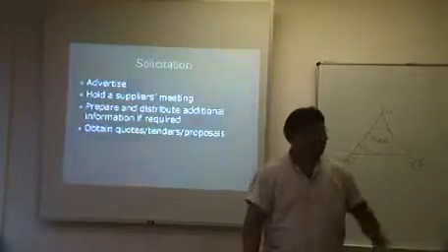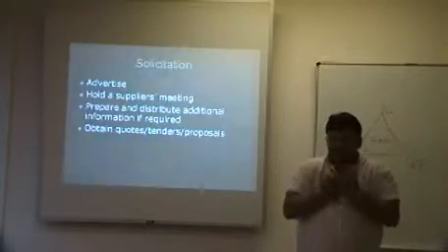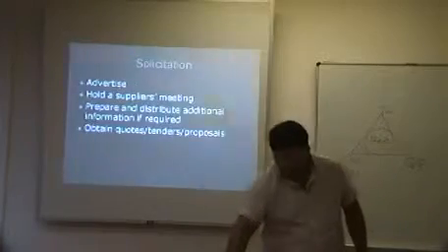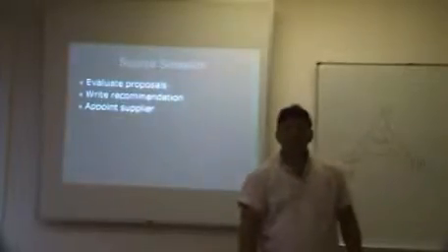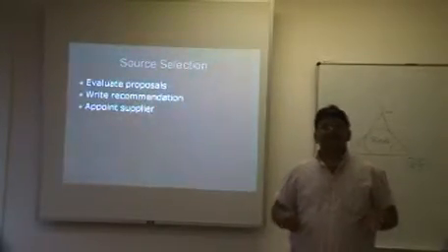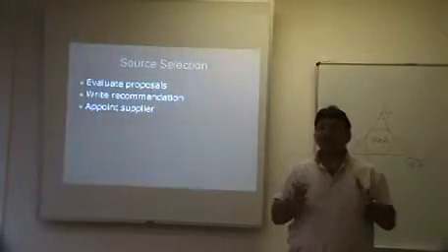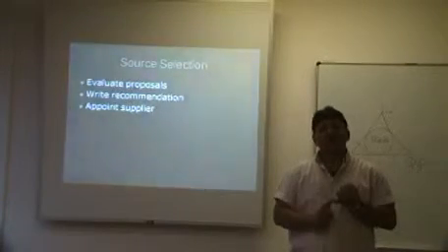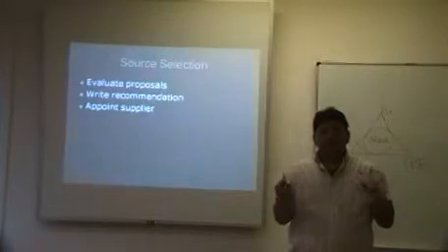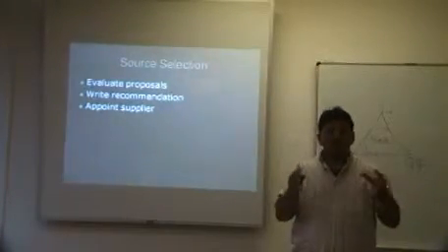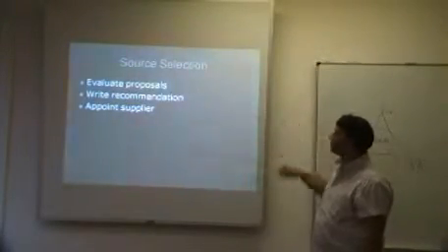Right? It depends on which process you went for there, and the company will receive all of those tenders or proposals. Source selection: what then happens in many companies, they will select a body of evaluators or adjudicators. People who have the technical knowledge, the skill, the know-how of this particular product and solution, and they will sit on this evaluation committee and they will evaluate the proposals.